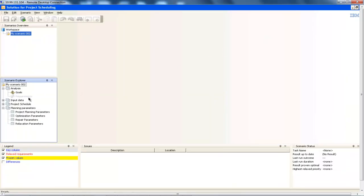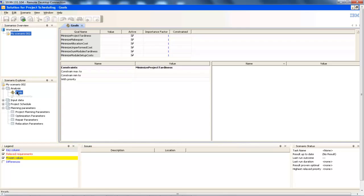A typical ODME project has a set of goals and requirements defined, a set of input data and corresponding output data known as the project schedule. We can also interact with the application in a number of ways, especially by adjusting the planning parameters. These include the project planning parameters, the optimization parameters, the repair parameters and the relaxation parameters. Relaxation parameters are of particular interest to schedulers because through these parameters they can identify and relax constraints that are preventing a feasible schedule being generated. In this application, a number of goals are defined, including project makespan, cost and so on. Here it is possible to activate and deactivate each goal as well as setting an importance factor that will drive the optimal solution. The combination of these goals will drive the production of a schedule that is optimizing them.